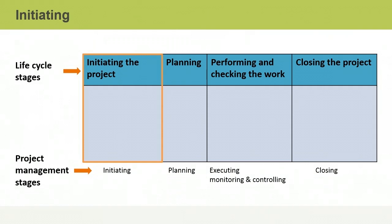The following are the project management stages that describe the project manager and team's activities and responsibilities as a project progresses. The initiating stage includes processes that help to start a new project or a new phase of a project already underway. These processes involve defining new ideas and obtaining authorization to proceed with the project or phase. The initiating stage results in the project charter.